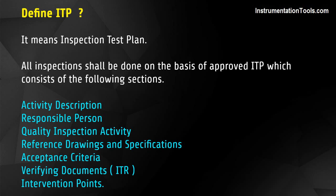The sections of ITP are: activity description, responsible person, quality inspection, activity reference, drawings and specifications, acceptance criteria, verifying documents, and ITR intervention points.